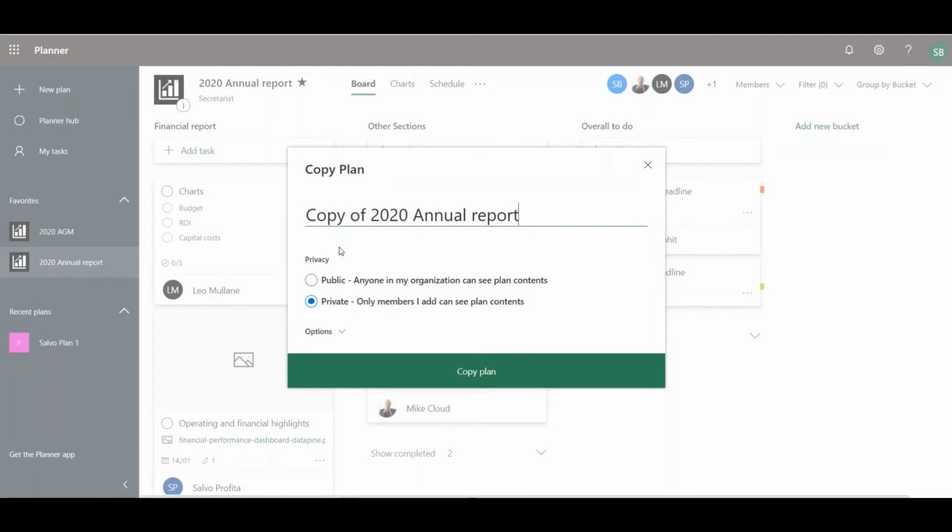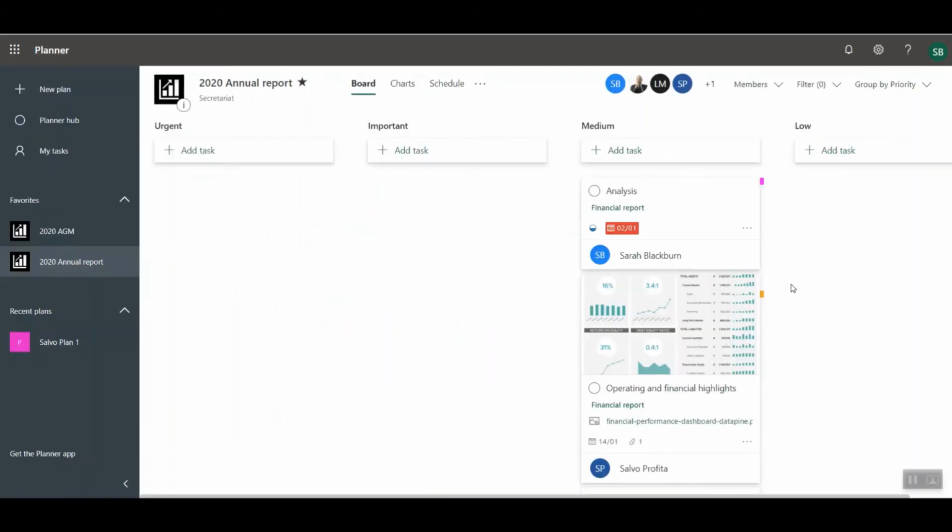So the only option really that you've got here is either to create it by hand, so copying the tasks over, or to use a Power Automate flow to create each of the tasks and put them into the plan in your existing group, because you don't really want to be creating lots of different groups. If you're interested in groups and how they're set up, we do have another video on that, so you might want to check that out.